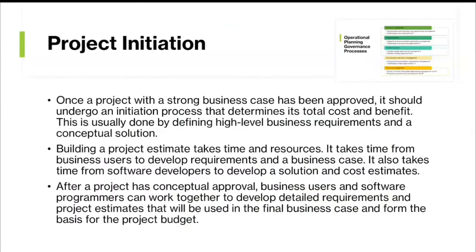Next, we have project initiation. Once a project with a strong business case has been approved through demand management, it should undergo an initiation process that determines its total cost and benefit. This is usually done by defining high-level business requirements and a conceptual solution.